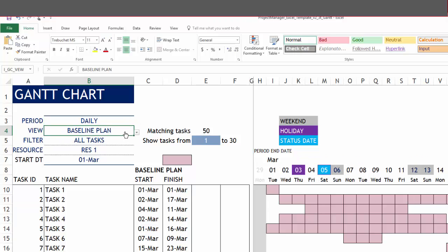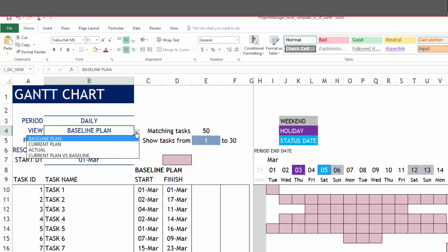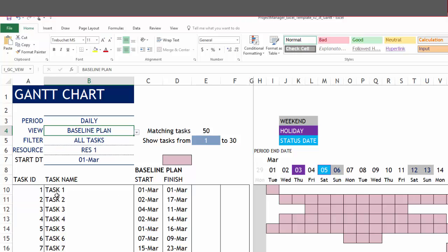The view, there are four options available. The baseline plan will represent each task baseline plan start and finish dates. These dates will be used to plot the Gantt bars.